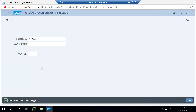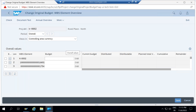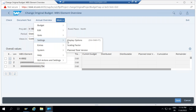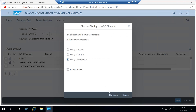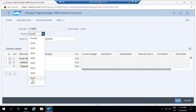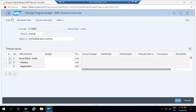Enter the project definition — that is K-202 — and press enter. Now it's exactly the same as before, just a few differences in look and feel. These are my WBS elements. If you want to see the descriptions, go to more, go to settings, go to display options, and select using description. Now you can enter the values. The period for which you are doing the budget planning — you can do year-wise or overall as per the profile setting in the system. This is how CJ30 is resembled in the Fiori app.